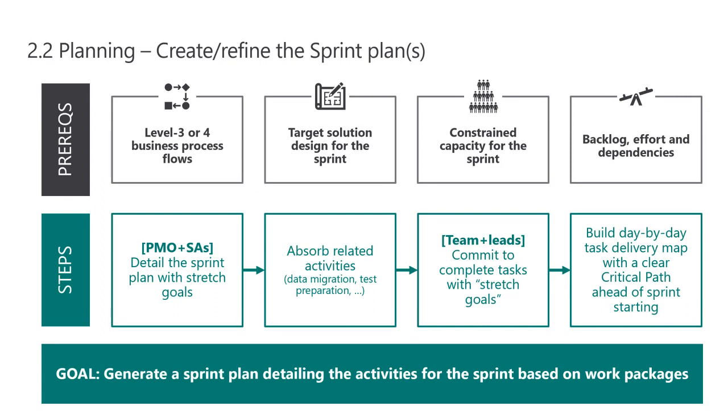So you do a combined plan where you say, in order for my process to make sense, to validate that at the end of the sprint, I need the following data for it to be meaningful. And the data migration team essentially is then feeding the project team the data they require as you go through the project. It's not a big bang at the end where they say, right, we're finished with data migration now, right? It's an incremental delivery.